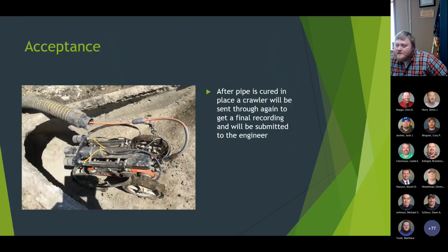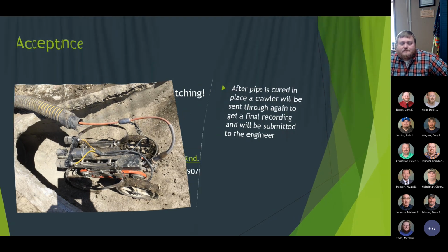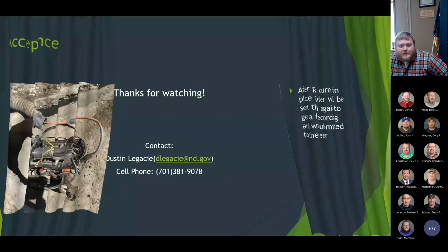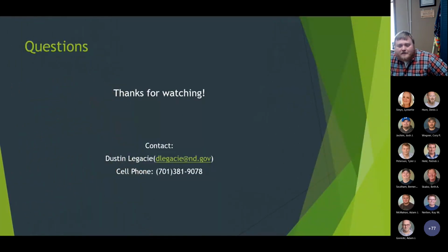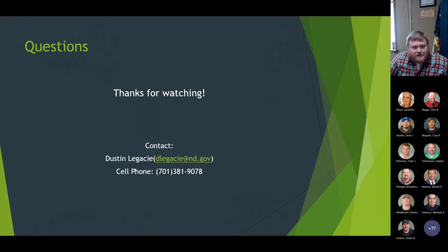And once they get done, they'll send the pipe crawler back through and get a video of it. And they will submit all these to the engineer, in which at that point the engineer will, I guess, say yay or nay, will accept it if everything looks good. And that is all I got, I guess. My information is on the page.